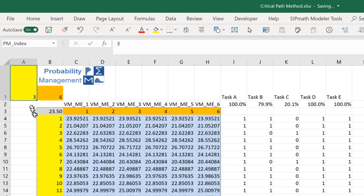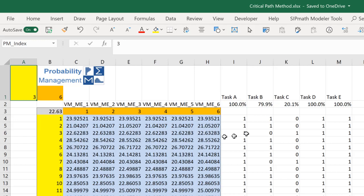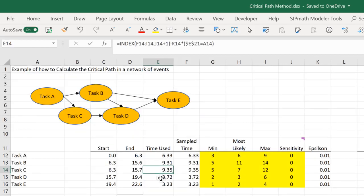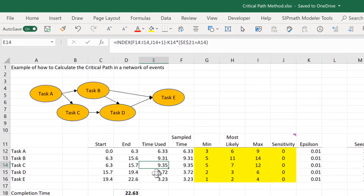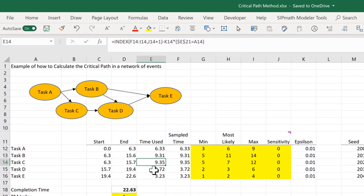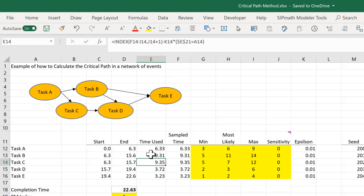First of all, you'll notice that this 22.63 is the 22.63 here. We can see in this particular simulation that task C is longer than task B. And therefore, C is on the critical path.